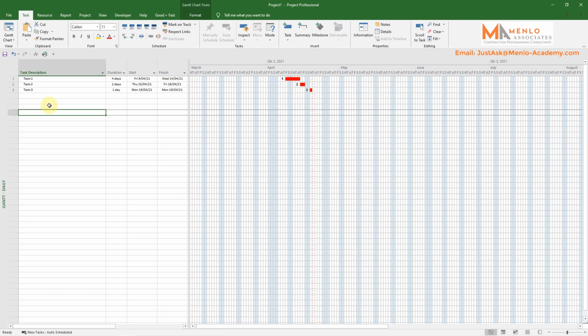In this video, I'll cover the options we've got to put constraints on tasks in Microsoft Project. How does this help us? By default, Microsoft Project assigns new tasks to start at the earliest possible point in time that they can. This type of task behavior is known as the as soon as possible constraint. Constraints are like a form of program logic that are separate to predecessor or successors.